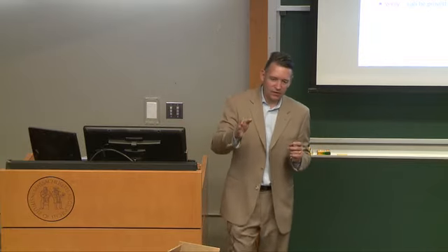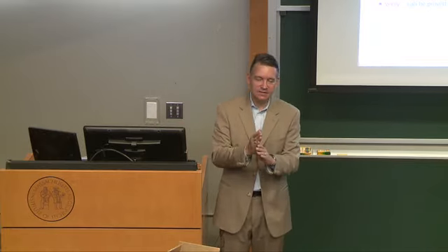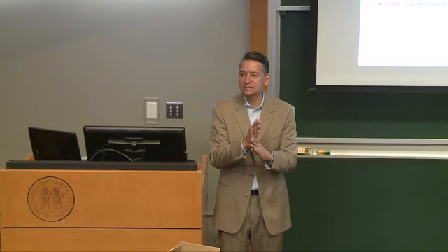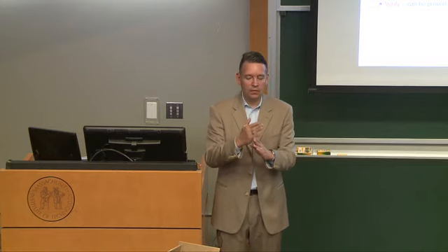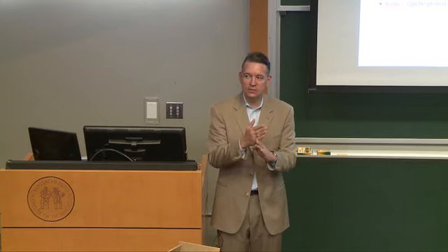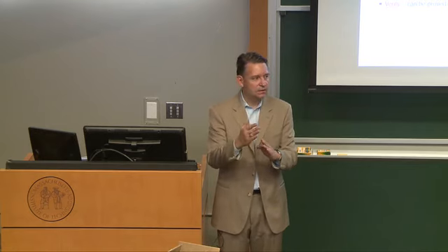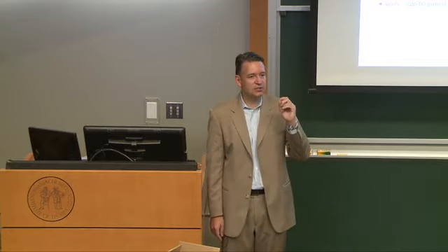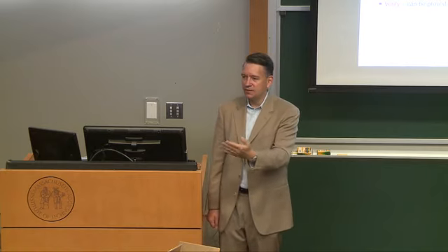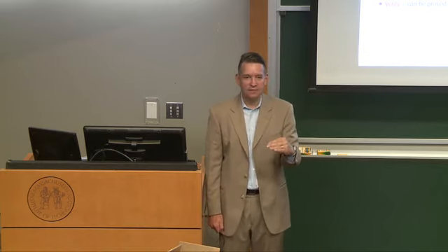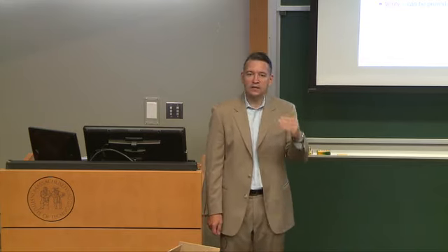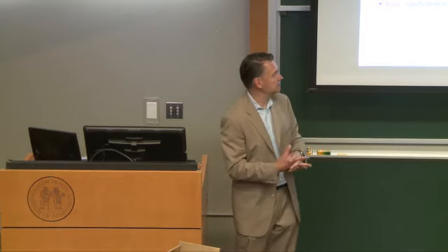That's right, and we'll talk about this a little bit. But if all of them are shall statements, they're all hard constraints. The objective space that I showed you may in fact have zero feasible space, right? So really knowing what is a hard constraint, what is a hard requirement, and what's flexible, that's very tricky, and that's why it's important to not just accept requirements. If you're going to run a project, you want to really understand every requirement, and if you think a requirement is infeasible, you have to negotiate. That's where the upfront negotiation becomes really important.